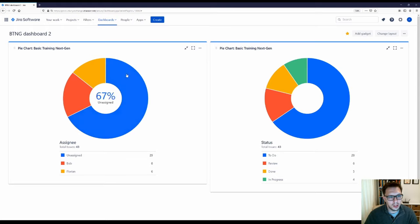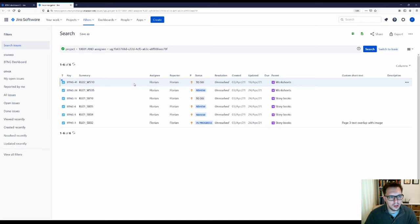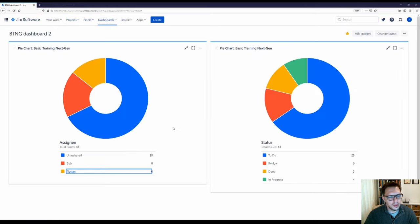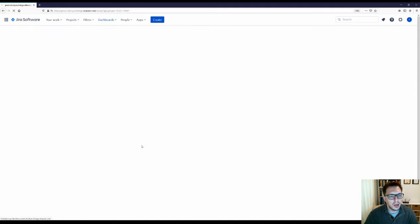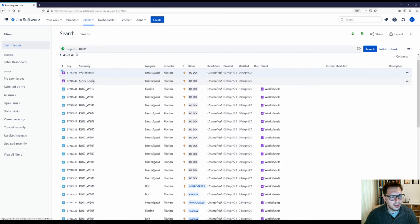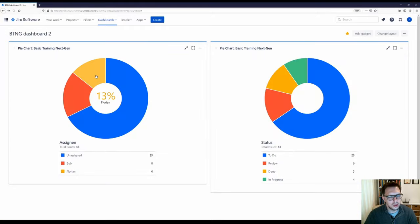The great thing about these pie charts is that I can click on any segment and see what's assigned to that person. If I click on Florian, I can see these six issues — some of them are in review, one is in progress, and some are still to do. I can then click on each of these and open them up in a new window. I can also see all of the issues by clicking Total Issues, which shows all the issues in the project, including the epics that these particular items sit in.